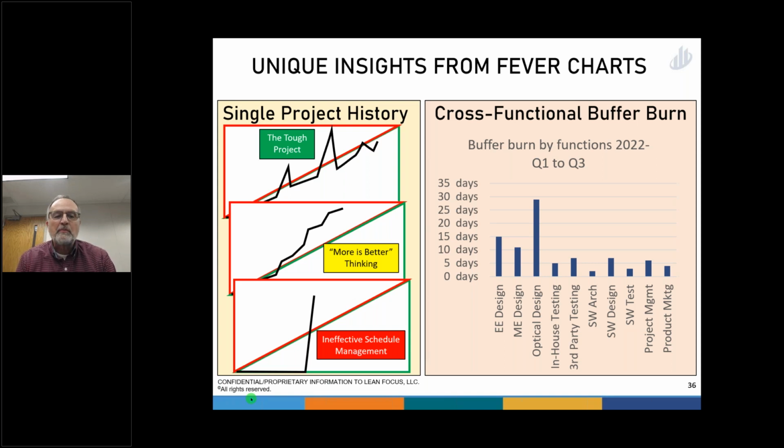People who are engaged in more is better thinking, it's not that there's something wrong with them. It's not that they have some kind of a deep-rooted problem. It's that we have to get them focused on a scoreboard that says, when this thing's in the red, we're going to get it out of the red. In one of the organizations where I worked, we had a rule. You need to be having a project meeting at least every other day on any $1 million plus project. It's not too much to ask for the team to meet for 10 minutes on a large project like that. If you're in the red for more than 2 days, you're going to get help, which means the boss is going to call you in for a meeting and we're going to go through it and figure out why you're in the red and get you out of the red.